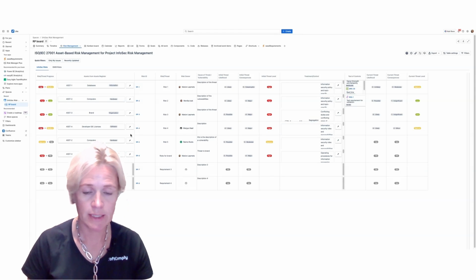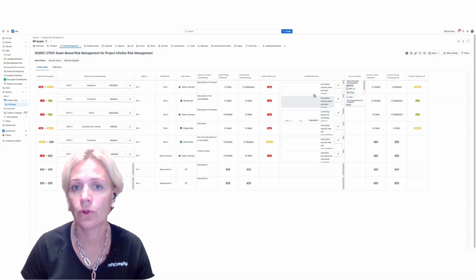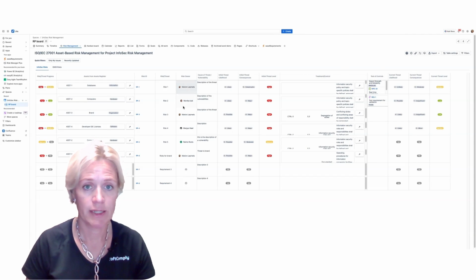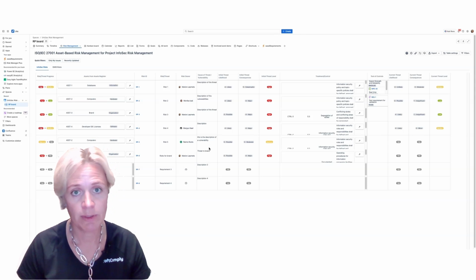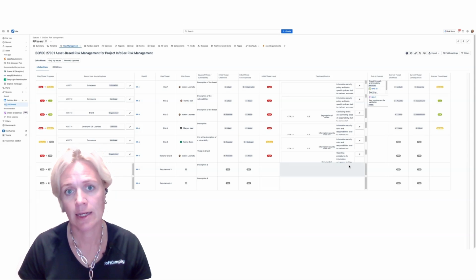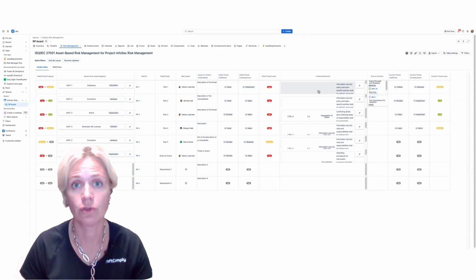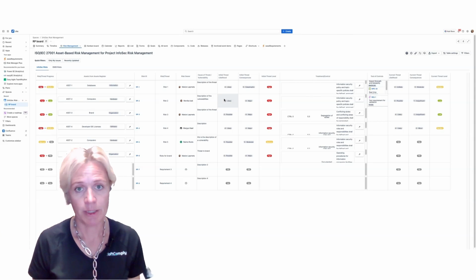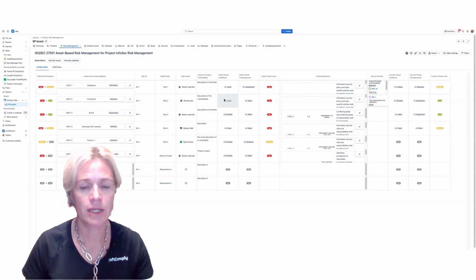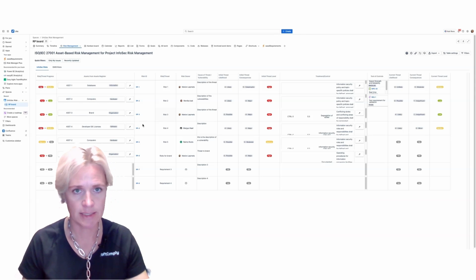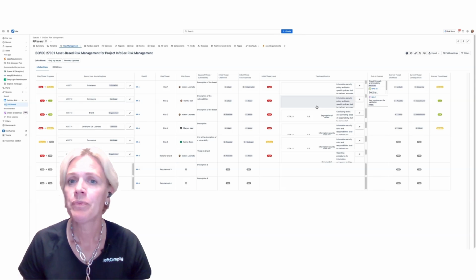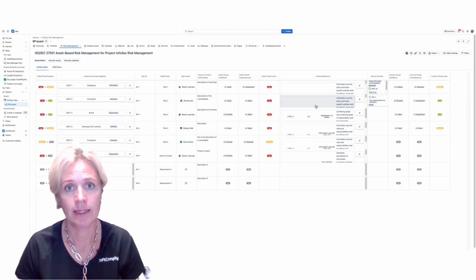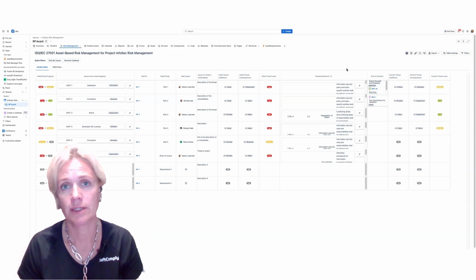In the risk review meeting, we sit down and we go through all of those assets. We identify additional assets and provide owners to them, and describe the threats, assess these threats, and probably also plan the implementation of the mitigation actions. Now, the risk review meeting is coming to an end. We're all happy that we have done a lot of work with the assets in this asset-based risk management table. Now we want to finalize and baseline the situation after the risk review meeting.